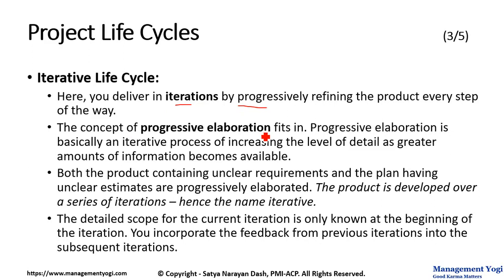Progressive Elaboration is basically an iterative process of increasing the level of detail as a greater amount of information becomes available. Both the product containing unclear requirements and the plan having unclear estimates are progressively elaborated. In Iterative Life Cycle, we don't know the requirements in full detail — in other words, unclear requirements — so we progressively elaborate on those requirements. Not only that, the plan having unclear estimates is also progressively elaborated, and the product is developed over a series of iterations. Hence the name Iterative.